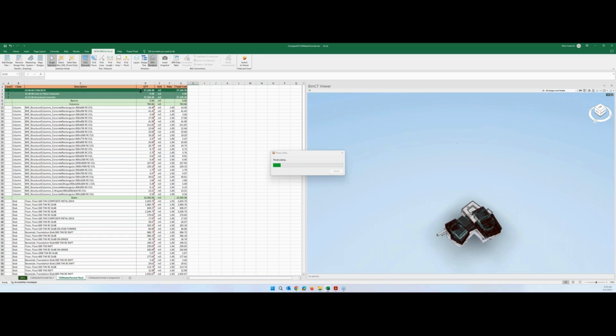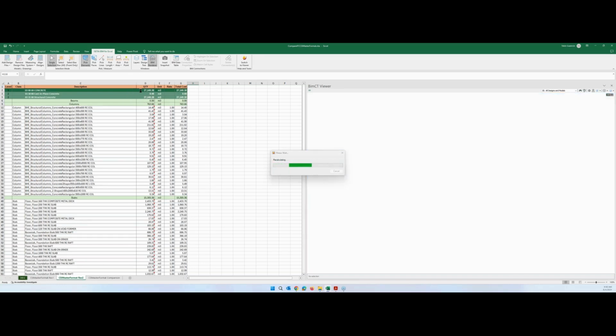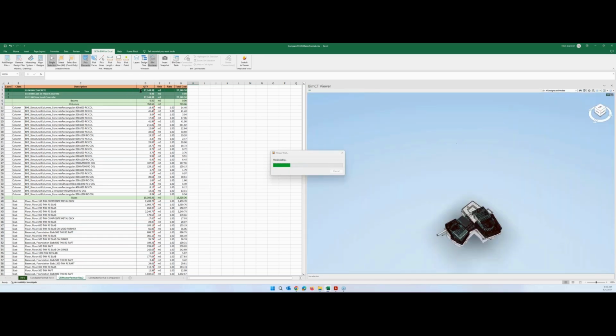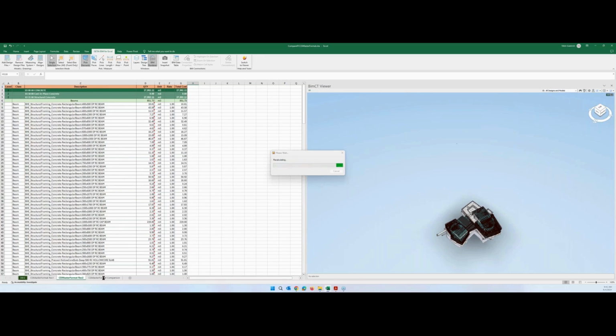And I have calculated 27,140 for revision 2 concrete. So I have revision 1 here, I have revision 2 now, and everything will be very easy now comparing it, because for revision 1 and revision 2, I created the master format in my comparison. So in here, we will now have a list of the items which are increased, decreased, or created.